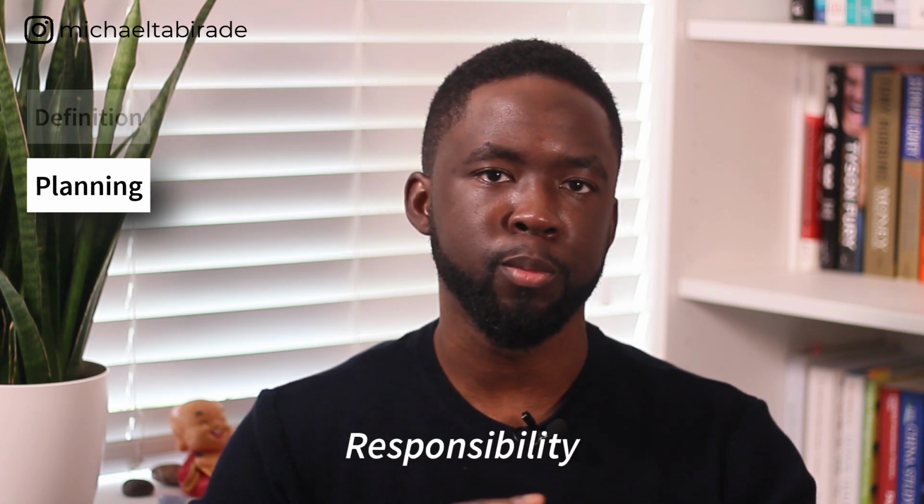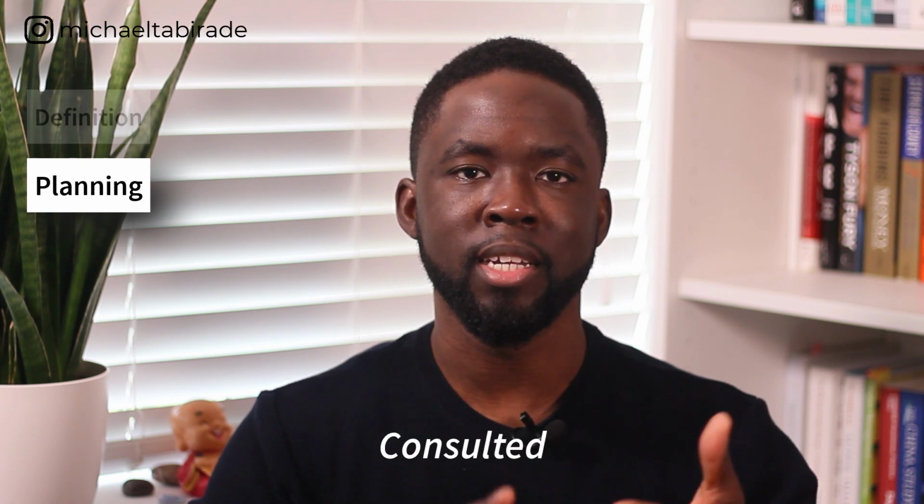Another thing to back this as well is a RACI. So this is responsibility, accountability, consulted and informed. And it's a great way of highlighting, again, those different things. So essentially, when you have a team, you have the team roles at the top and you have the responsibilities on the side, and you highlight in each cell whether that person or role is responsible, accountable, consulted, or informed. And again, it's a neat way of just really knowing who should be doing what. And maybe this is an activity you do collectively as your team starts to grow.